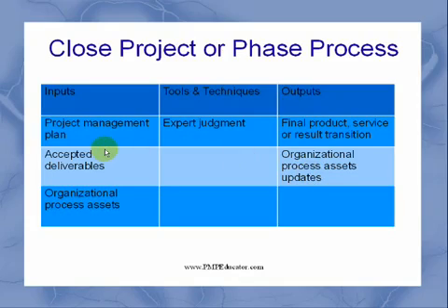The inputs for this process are project management plan, acceptable deliverables, and organization process assets. Remember, there is no enterprise environmental factor as input.